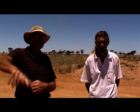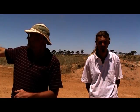And so David suggested we move down the creek to a place where there's no curve, that's straight, because we needed to taper back the profile to make it a more gentle access in and out, because it was just too steep. And the other contingency up there is the fact that there's an optic fibre cable running right through there, so we did not want to go digging around there.